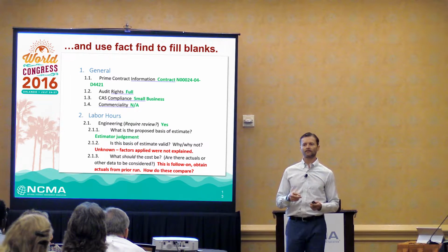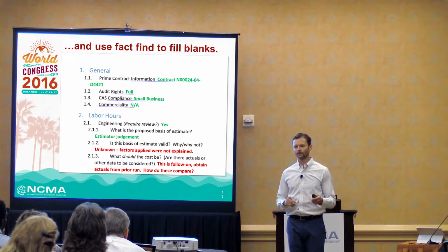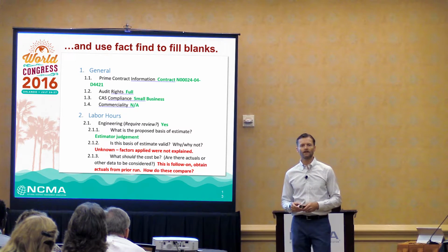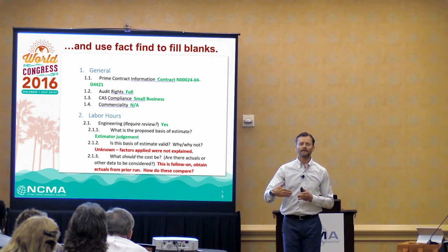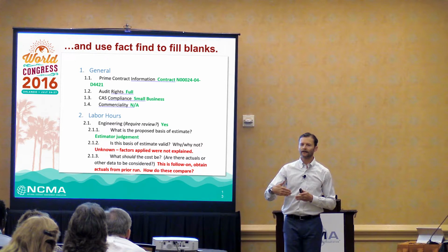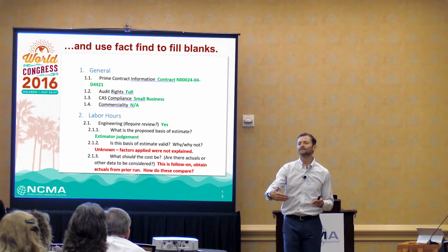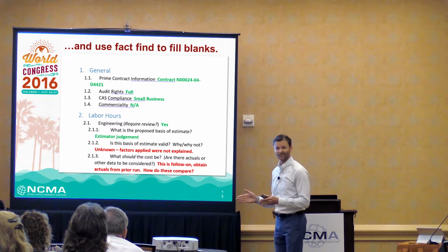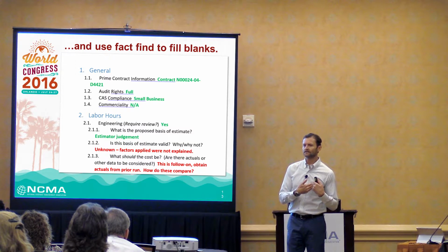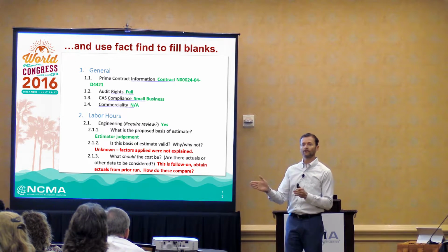Question is, do we get forward pricing rate agreements from our subcontractors when we're doing the rate analysis? It depends, right? So sometimes when we're brought in, we're brought in as a third party, when you have a DCMA audit assist, if you can't live with waiting 3 months or 4 months or however long it might be, then we act as that audit assist. So we do get all their rate and factor information. So if they have approved rates, then we'll get the letter, we'll get the rates, and we can just do a quick rack and stack and compare the two.